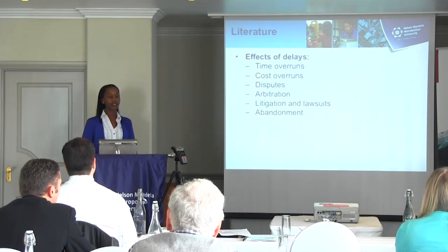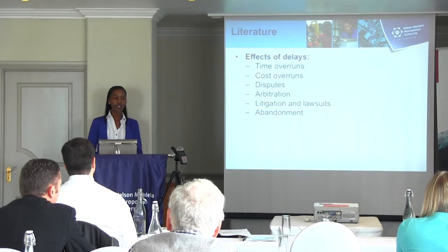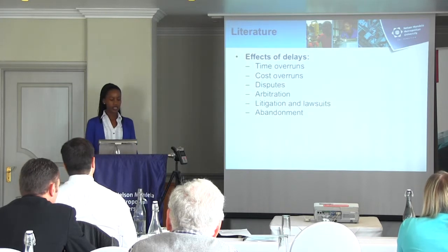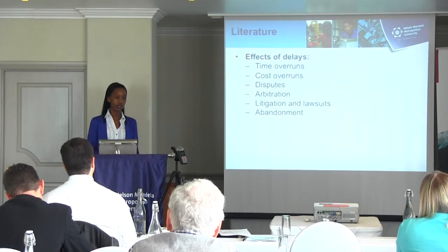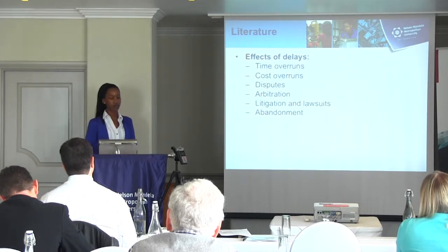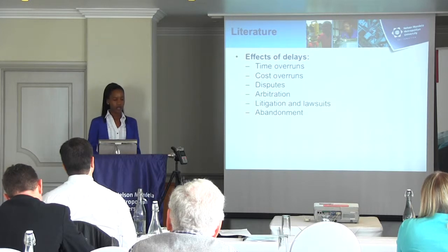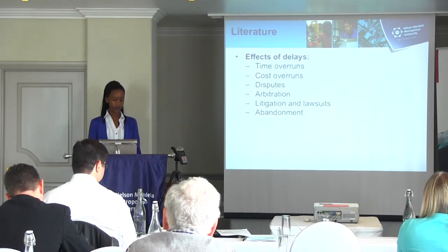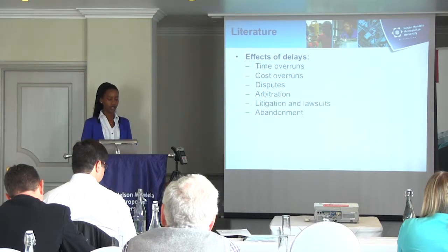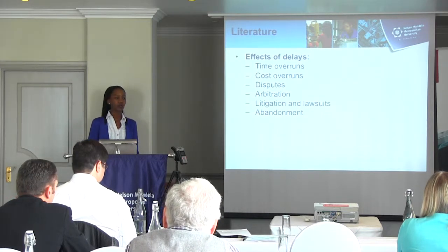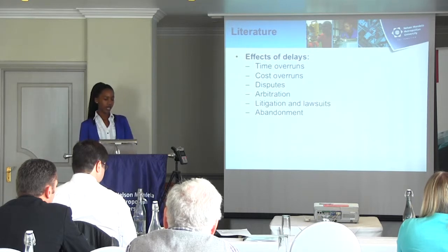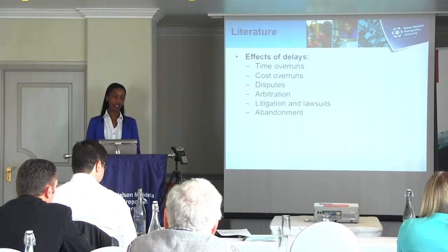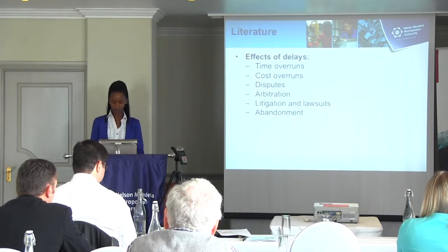Thirdly, in any project, I'm sure as all you know, there are conflicts that arise. These could cause disputes that are sometimes an effect of delay. If conflicts can't be resolved by dispute resolution, then the next step is arbitration, causing even more delays. Failing which, the next step would be litigation and lawsuits. We all know how long court cases can take, and the least popular of these effects is abandonment of projects.